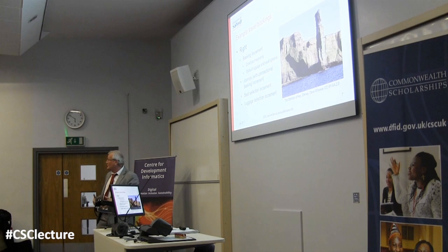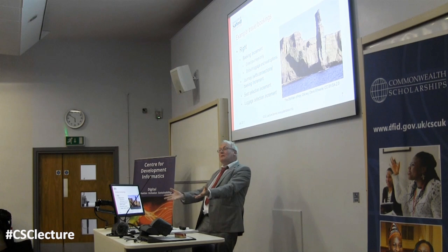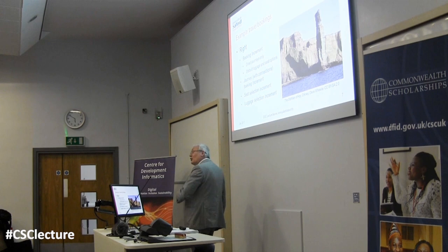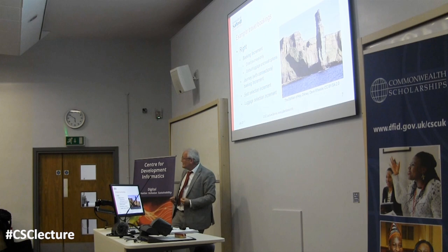But what you've got then is something you can take to users, stakeholders, customers, whoever it might be, and say, look, this is the bare bones of your booking system. Is that what you want? And they can say, yeah, brilliant, on you go. Now we can worry about, do you want to face the front or the back, or do you want to be on an aisle or next to a window? And that other detail can then be added in subsequent phases.